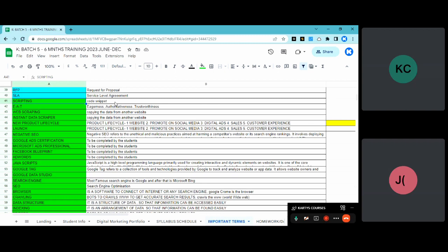Okay, there's something called WIP, work in progress report. Okay, so there will be terms and conditions. How often you should send it and all that will be written in the document. Now, sometimes if the project is very small, it's only 24-hour work, then the WIP report can be every 6 hours. Okay, what have you done every 6 hours?